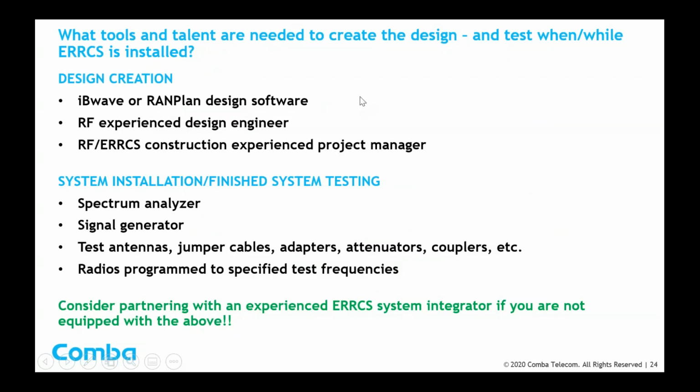Okay, so what tools and talent are needed to create a design and to then test while the system is being installed? For design creation, you need to have a package like IBWave or RAN plan. You need to have an RF experienced design engineer who understands RF, understands public safety networks, and is certified to design in IBWave or RAN plan.